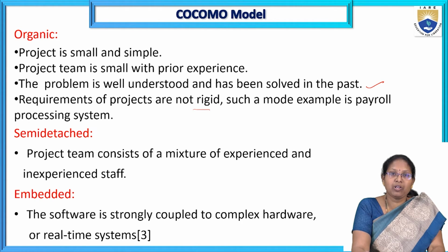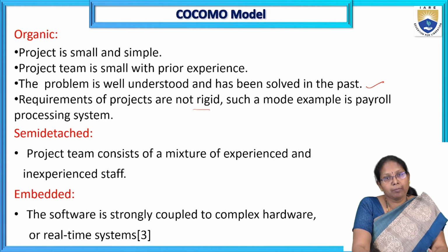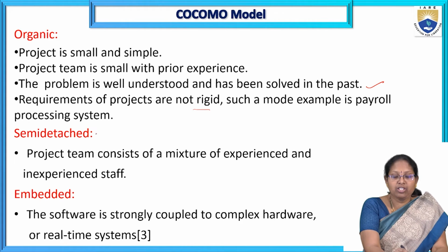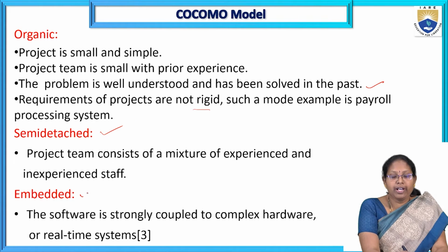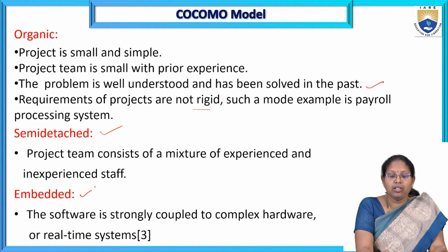So the categories of projects are organic, semi-detached, and embedded. COCOMO models are applied for all of them. Semi-detached projects require a mixture of experienced and inexperienced staff, and have some organic properties and some embedded properties.